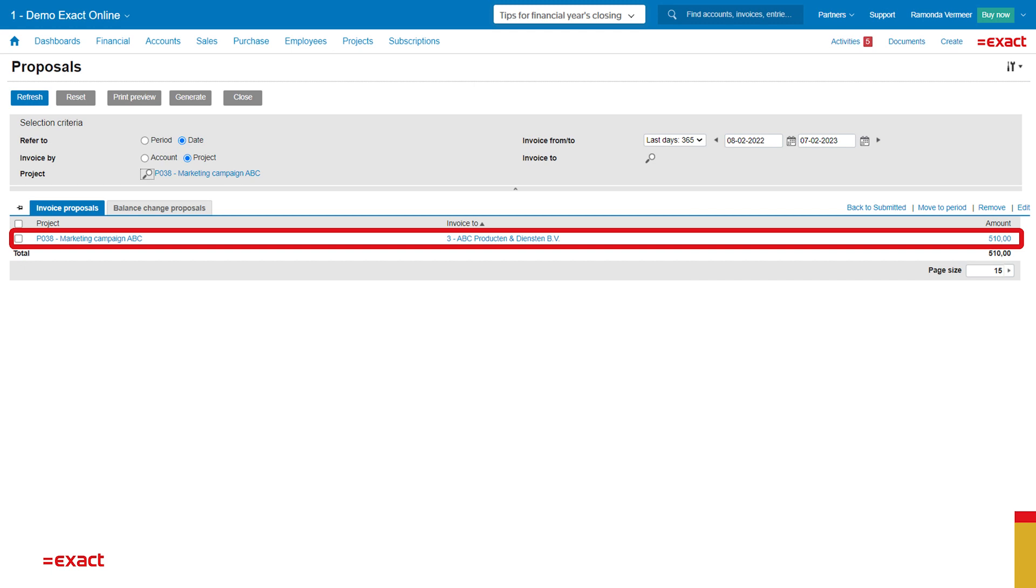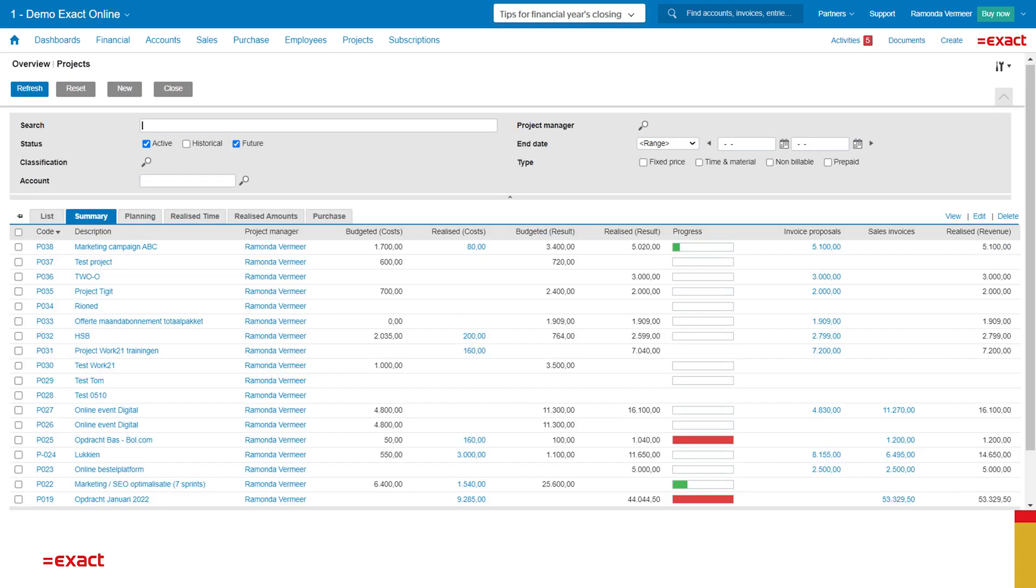I want to close off with an overview of my projects. This overview shows us the current state of all active projects. What are the budgeted costs and what is realized? What is the progress based on the time that is registered and which sales invoices have been sent? This way I can see what needs my attention and always have a real-time overview of my projects.